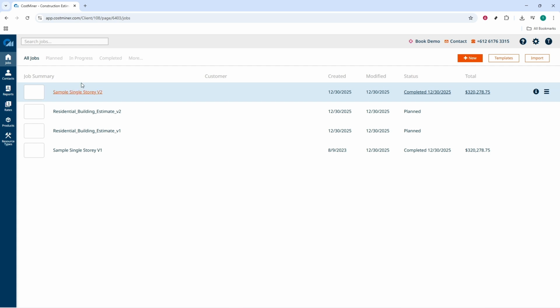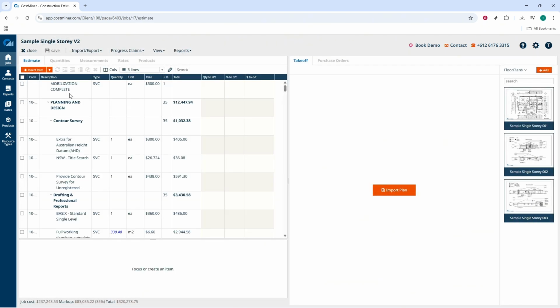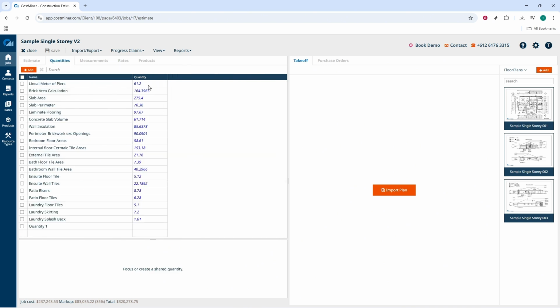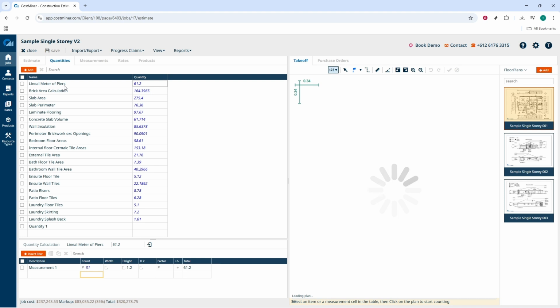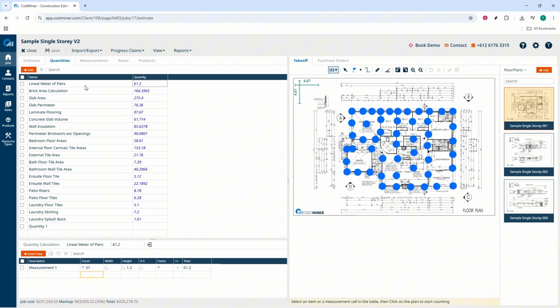Now modify each copy to test the scenario you're evaluating. If you're comparing design options or doing value engineering, adjust the BOQ quantities to reflect revised scopes. If labor rates have changed, update the resource rates and check any productivity assumptions that drive crew outputs. When material prices shift, swap in the new unit costs. For commercial changes, adjust overhead and profit or other markups so they match the proposal strategy for that scenario.